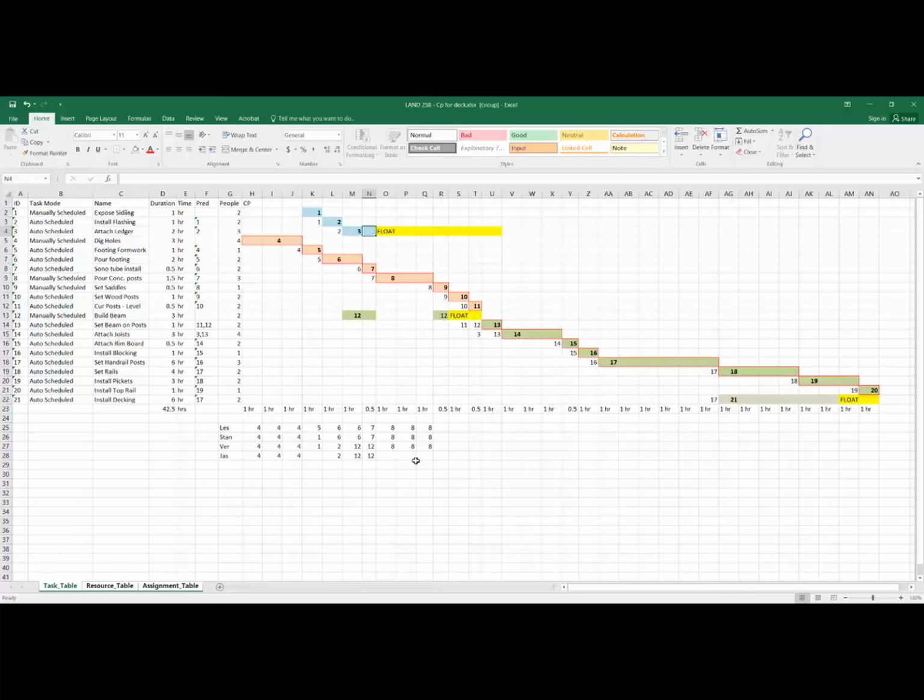And again, nothing in here seems to work for that time period right now, and we're going to have to move that. I do have something in here that's more critical. No, I'm going to move that out because it has a float that can come all the way out to here. So let's do this. I'm going to get rid of that here. And I'm going to move that at least down to this point because here we can have 3 people. And I'll remove these events here. And that's number 3.